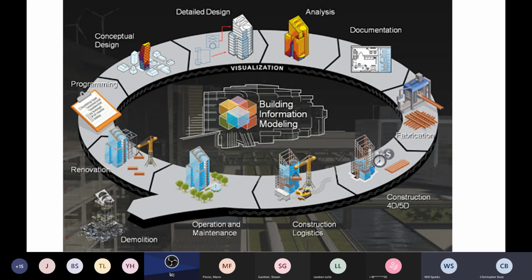Yeah, absolutely. And I think a lot of the answer to that is making sure that things are passive or don't take much time on the job site to implement. So in the case of Versatile, it's on the tower crane, it's tracking things, it's building a log for us, and all that we do in the field is change the batteries on it. In the case of the 360 video walks, we are doing video walks on our big job sites daily now. So someone's walking through the job site with that 360 camera, and it's tracking on a daily basis how much has changed, what's different. So a lot of that is offloading the manual task to an AI software rather than trying to do it manually on the job site.